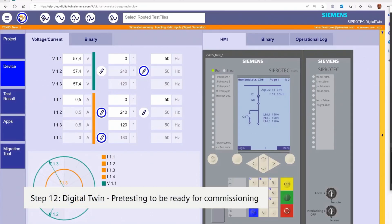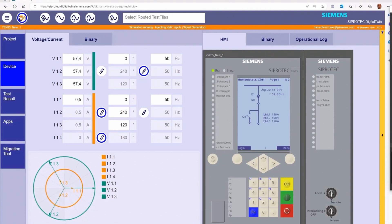Migration Step 12. Siemens recommends using the C-Protect Digital Twin for pre-test of the device function to reduce the commissioning time.